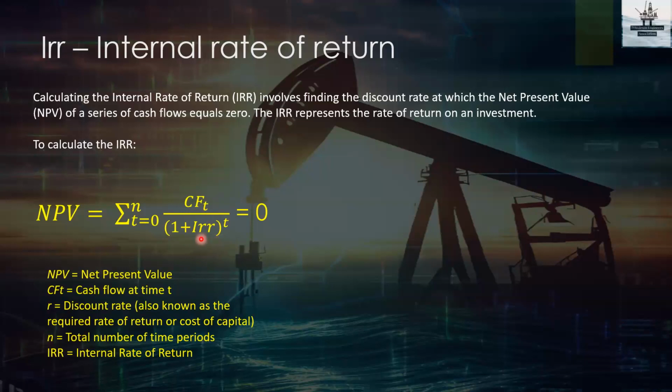And whatever value you pick, that value should make the overall NPV become zero. When will NPV be zero? NPV will be zero once you reach your initial investment after discounting that price. So if you know that, then you will know the value of IRR. The value of IRR will be adjusted in such a way that the NPV value becomes equivalent to 0. So IRR will tell you the discounted percentage at which your overall outcomes will be equivalent to your investments. Outcomes minus investment will be equivalent to 0 with the discounted percentage. So that value will be understood by that.